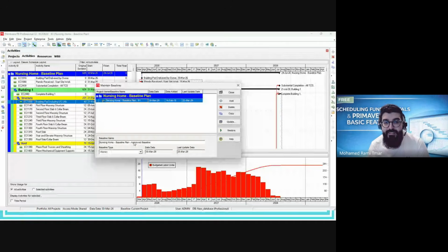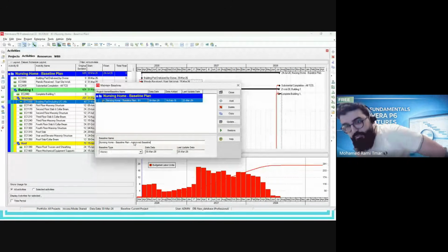Okay. Thank you, Haki, for the question. This is a very important question: how many baselines can we create in the same project? Let me answer this question. In MS Project, you can assign only 11 baselines, and more than 11 the system will not allow you. Even if you try, there will be a bug. I mean, it will be a disaster.